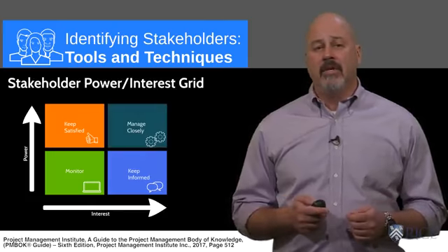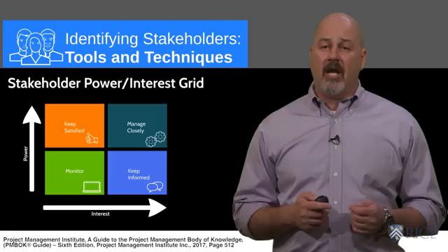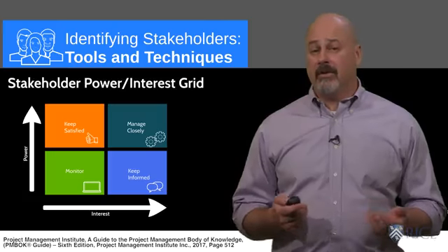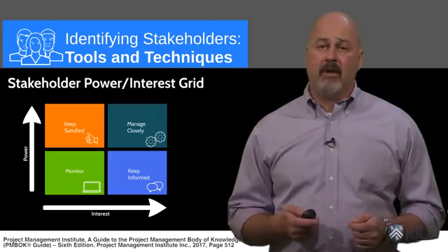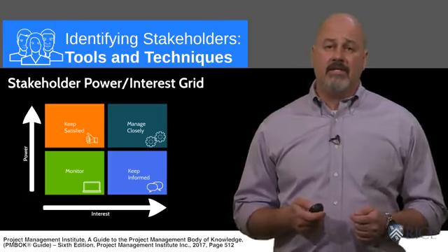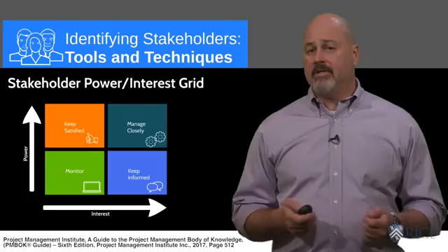And finally, a stakeholder that has high interest and high power is someone that you need to manage very closely. This person has the power to impact your project, and it is necessary that you keep that person informed and up to date on the project.